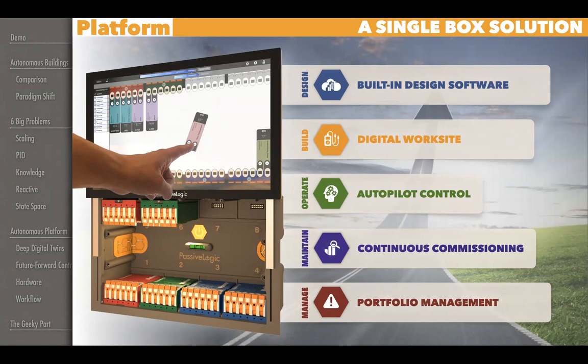When we took that into consideration of how the process works, we go through a design-build approach and we need to connect the dots between what is the intent of the building and was it installed correctly. So first is putting a screen right on that controller and making it all software-defined I/O. The I/O can then check that all your wiring is done correctly and that it meets the definition of the components you connected to it — whether you're connected to a thermistor, a pump, or a chilling plant — and make sure it's working as a system as it was designed.